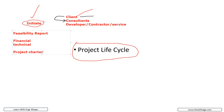If the answer is yes, your project is going to move forward and you are going to compile a project charter. The project charter is a comprehensive document in which you give the green signal that the project is going to start. It includes specific deliverables — for example, this building is going to be 10 stories, 2000 square feet, with this much funding allocated. That completes the first phase.